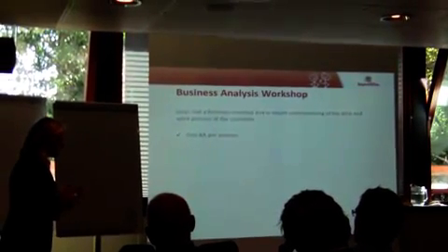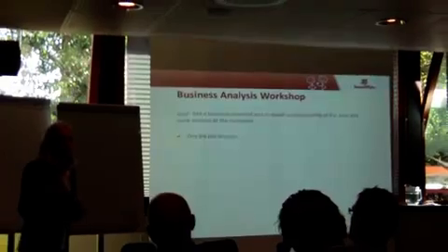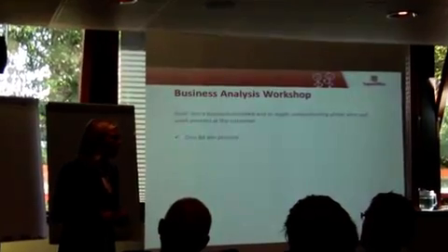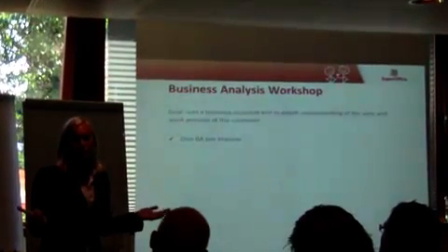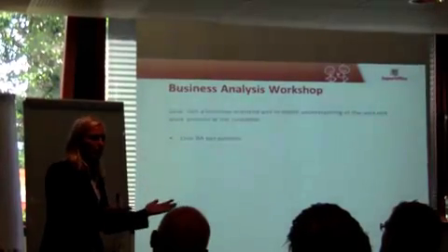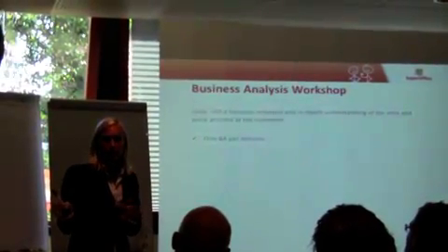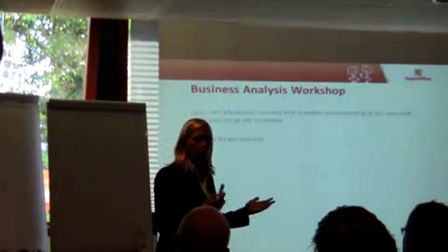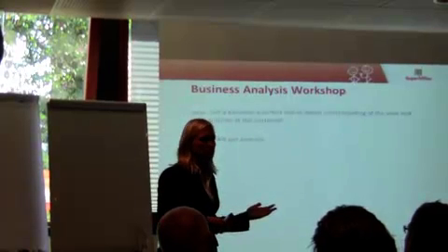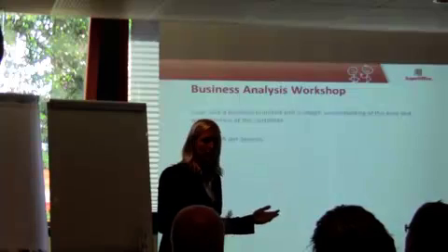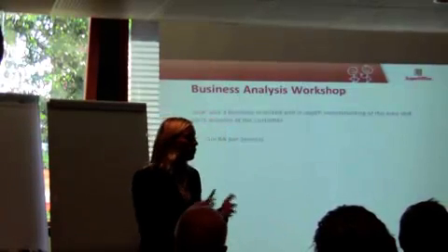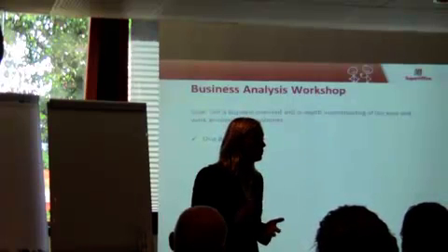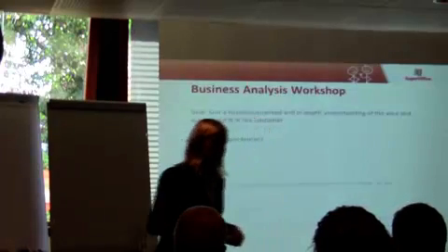What's important, and you will understand why, is that we need to perform one BA, one business analysis, per process. That is because the agenda for the day, as I will show you later on, is that we spend half a day on mapping and going through the process, and half a day going through the area, doing a SWOT, and also letting the customer present their business, their customers, the market they're on, etc. So it's very difficult to be able to map more than one process per day.